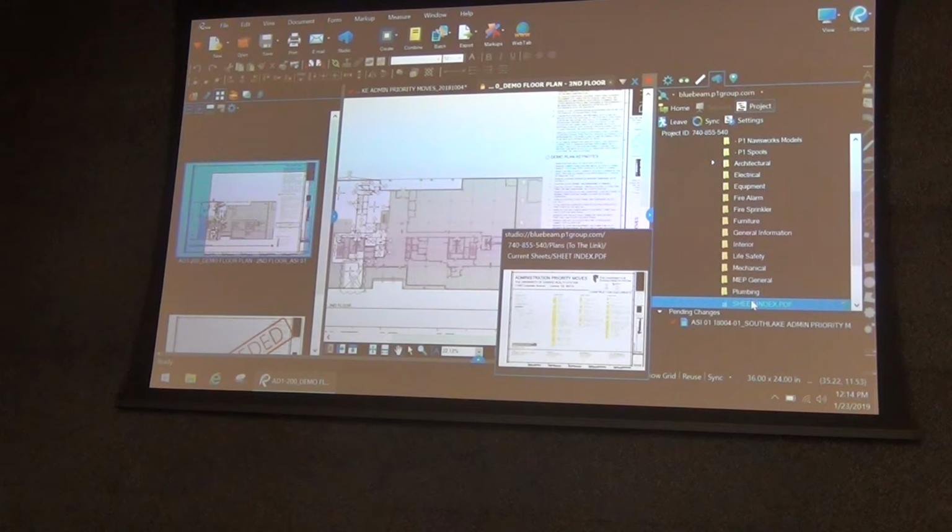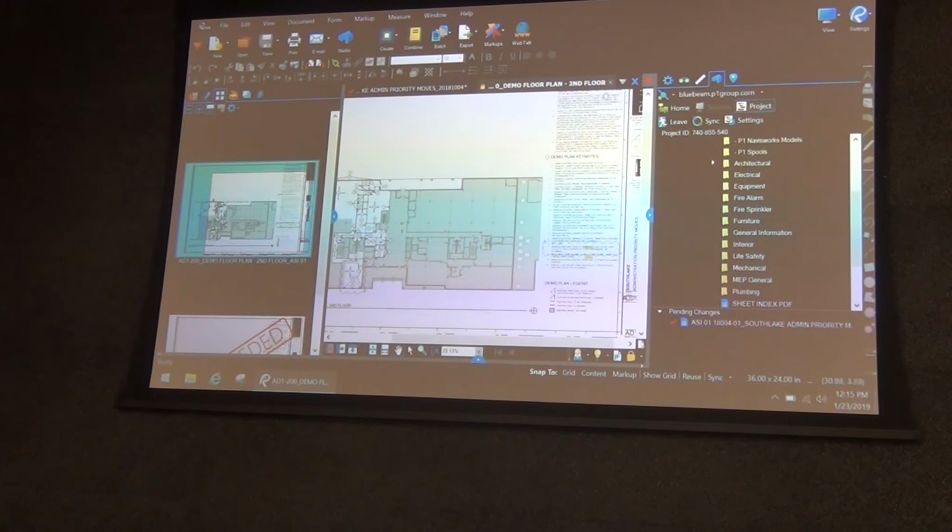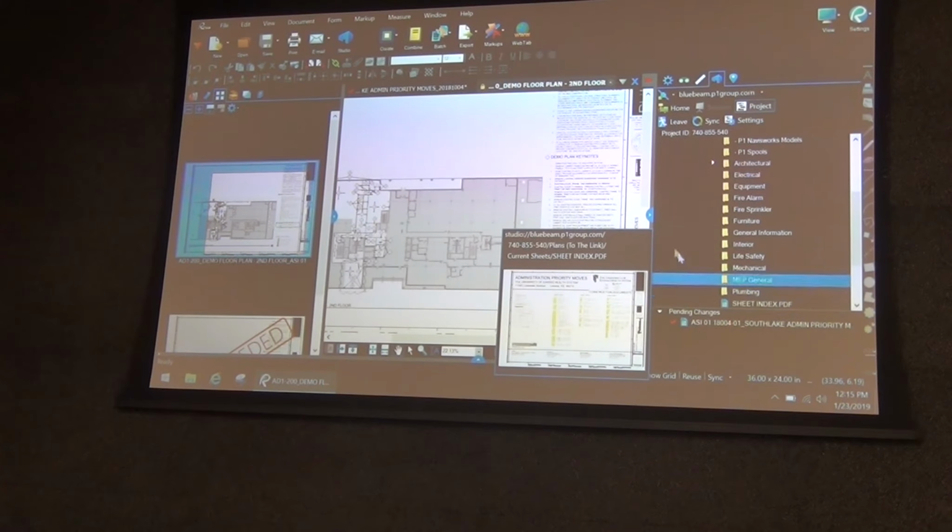It all automatically happens on its own. So when you run batch link, first you do that auto labeling, and then anywhere throughout the drawings, it detects whatever's in front of the underscore, which is what it's looking for. So if it sees something like A101 anywhere in the drawing, it automatically links that to the appropriate page.